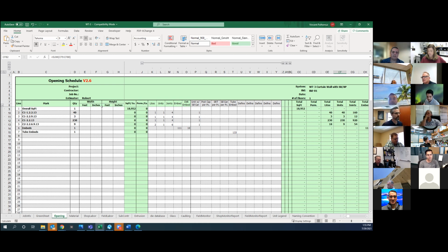We still have a lot of jobs that we bid as plans and specs, meaning we're taking our architectural drawings and sending them to Pole and Americlad and asking them for a price. We take that lump sum price and plug it in. Sometimes we sketch out what those shapes are and send them back.